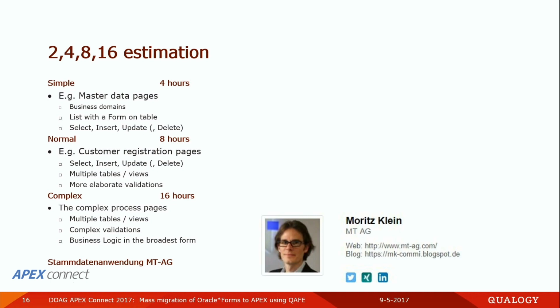If I have a master data page, which is just a domain table with business values, I can build that within 4 hours. And it will list a form table. It will select, insert, update, and probably delete, because most of the time deletes are just a checkbox telling this is not a valid record anymore. And if you have a normal page that is probably with multiple tables and views in there manipulating data, and everything else is complex.